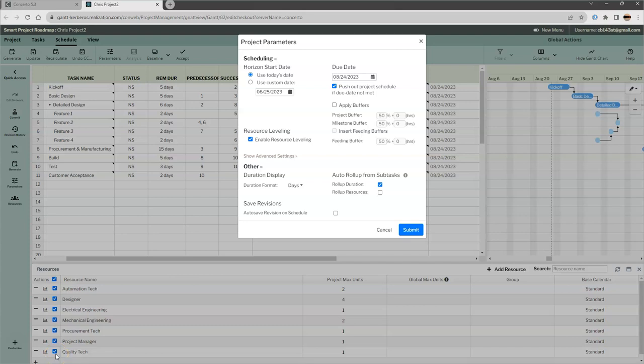Typically I'm going to stagger on those resources that are most critical for me, the ones I'm most concerned about, the ones that typically I run out of and are in high demand. So for sure those I want to stagger on. The rest, if I stagger on those, then the rest of them will be fine, and I don't need to worry about excessive staggering in the project.